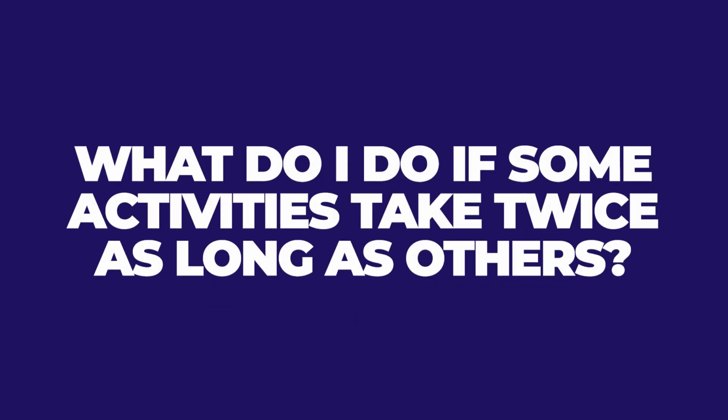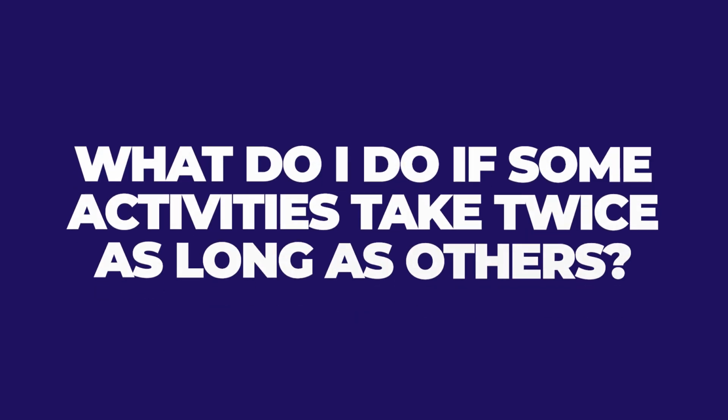What do I do if some activities take twice as long as others? I love this. You can either get 2 separate pre-planned, onboarded, and trained crews early on, or you can split that crew in half and put them in succession. Like for instance, watch my hand, and I've drawn this before, so I'm just doing this a number of different ways. This big long duration can only start way over here, finish to start, but if you break it into two, then it can work behind each other in a smaller takt time.